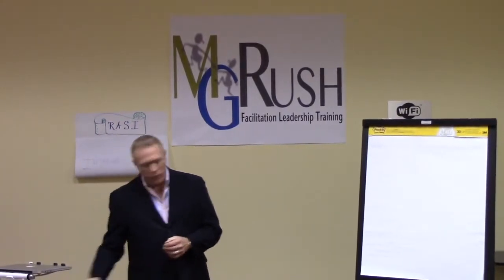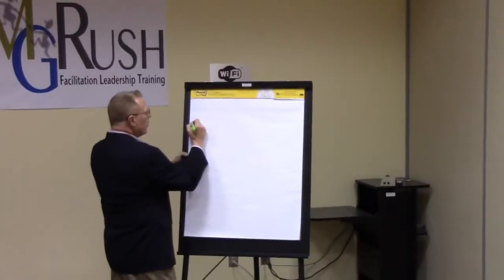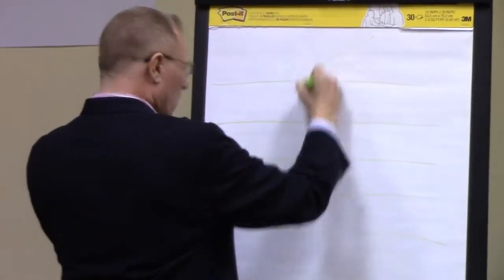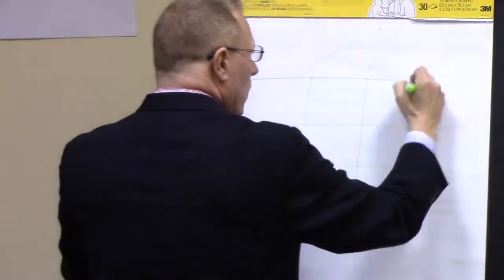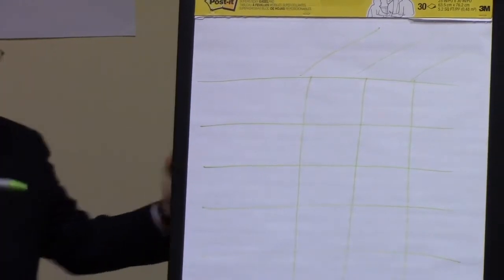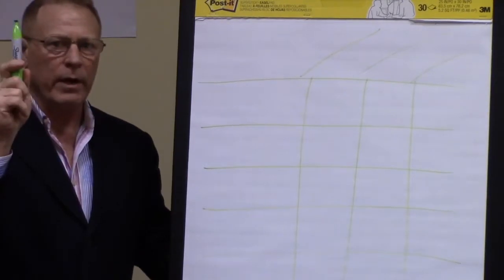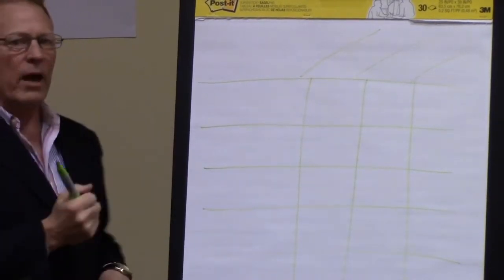known in the project world as a Gantt chart. We would begin with a matrix, and that matrix would line out what needs to be done to reach our goals and objectives. And to do that effectively, Dr. Tufte says make sure you take something such as grid lines, put them in a secondary color so it recedes in the background. You want your primary information to pop out at you. Primary information, of course, is who does what.